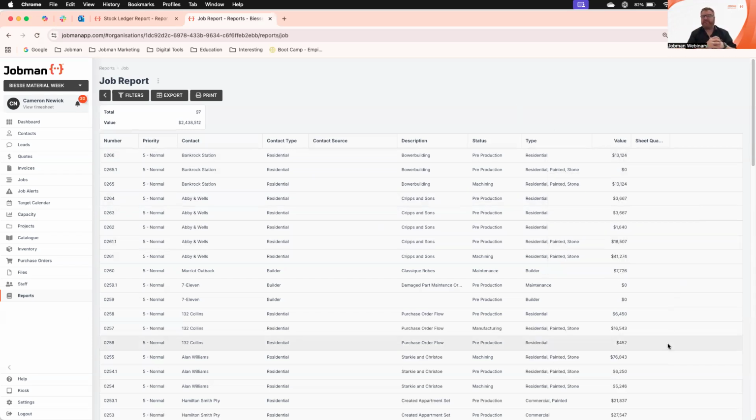And if I choose to fill that data out in my jobs, I can get a big metric for a lot of companies when they work with work in progress. Value is one part, time is another part. But for a lot of companies who understand lean manufacturing, the pacesetter is in fact the CNC. So understanding how many sheets are coming into those jobs, at a glance, I can run a custom report, filter through that information, see them, and then start prioritizing the movement based around how I want to get paid and where my scheduling flexibility is.